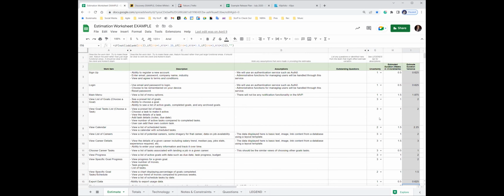So this helps in a lot of ways. One, it helps us really not pad everything equally because everything doesn't need the same equal padding. Some things I've done are pretty rote and are not going to change as much. It also helps me identify things that are risky because I don't know a lot. And so when I start the project with you, I will usually identify all of those and I will do code spikes, or those are maybe the stories we groom first to de-risk some of that. So it's better than just saying, oh, that'll take about X number of weeks, backing up and just giving the whole thing. I am looking at individual things. I am looking at complexity, and I'm trying to show you an optimistic versus a pessimistic total.